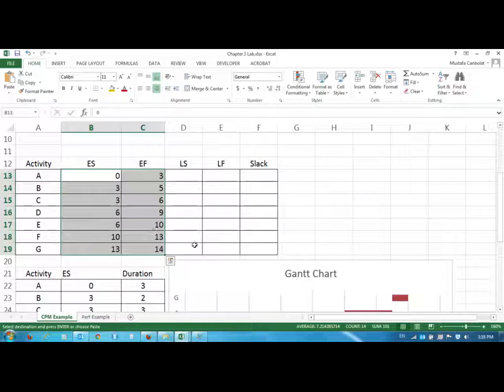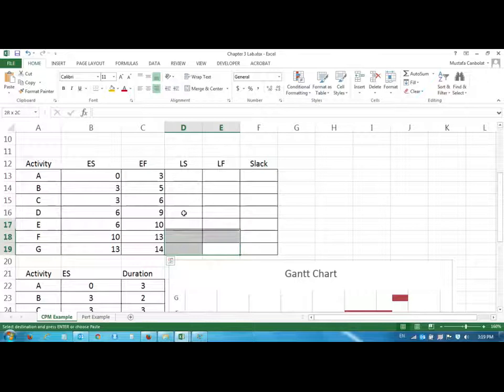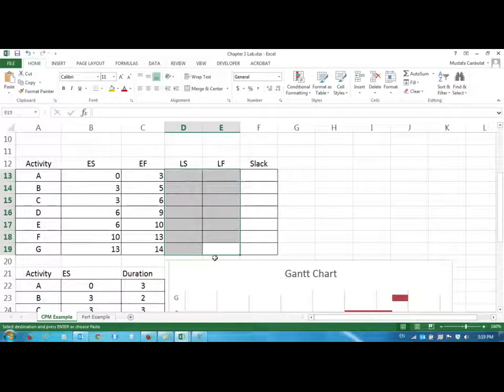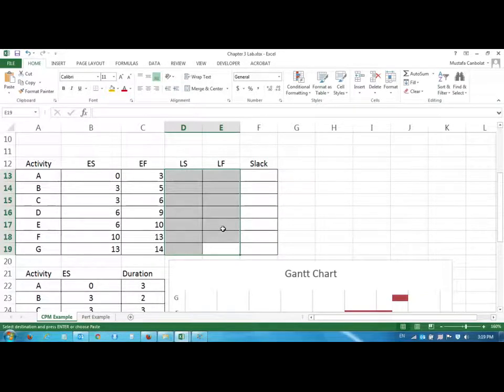The late start and the late finish values are going to be filled out from the bottom going to the top. So this is called a backward pass. So we have to do this in this way otherwise we are not going to be able to do this.